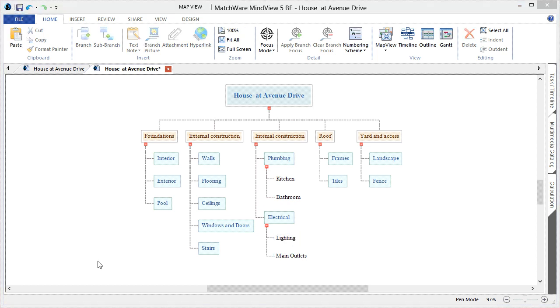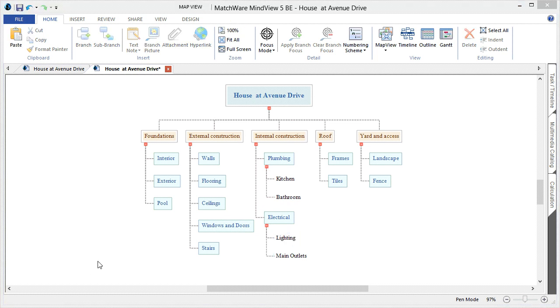As with most WBS software tools, it becomes imperative to start adding specific information into the WBS. In this case, we will be doing an estimation of labor hours and material costs for each specific section.